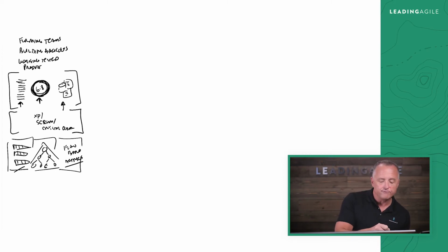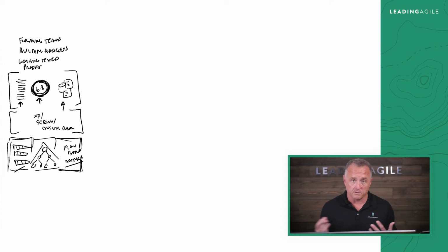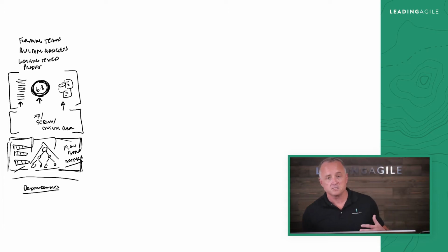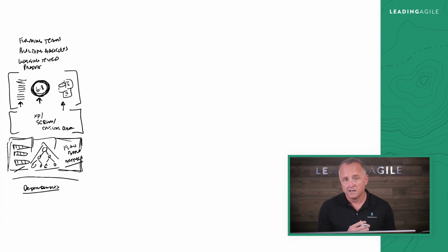I have to have a way of flowing work into that organization, and I have to have some way of being able to measure on the backside if that organization is performing the way we want it to. The thing that makes that hard, and the reason why people don't do it, is because they're dealing with dependencies, right? All over the organization. Dependencies can come in the way of organizational design, can come in the way of requirements and coordination. It can be technical dependencies, things interlocked all across the technical architecture. Technical debt can be kind of a form of dependencies.